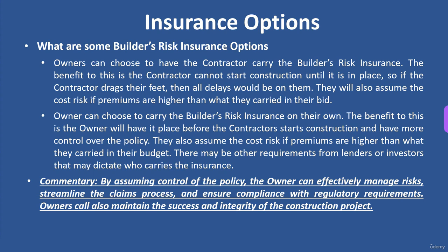I did have a project once where the owner dragged their feet carrying it, and the contractor had a delay claim. For some reason, whoever was representing the owner totally forgot about it. By the time they got the insurance in place, it was like 2 or 3 weeks. The contractor had a delay claim because he started work, but then realized the insurance wasn't in place, so he had to demobilize until they had the insurance because he didn't want to assume that risk.